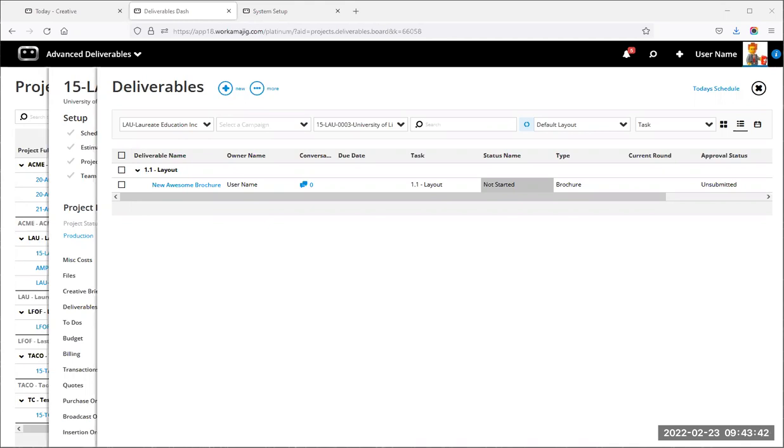Will it be a copywriter? Will it be an account manager? Will it be the contact of the project? So yeah, you're able to create these workflows that are dynamic based off of the key people and services. But you can also just pick people and say, all right, regardless of who's on the team of the project, a video review always needs to go to this person for review, even though they're not really part of the project.